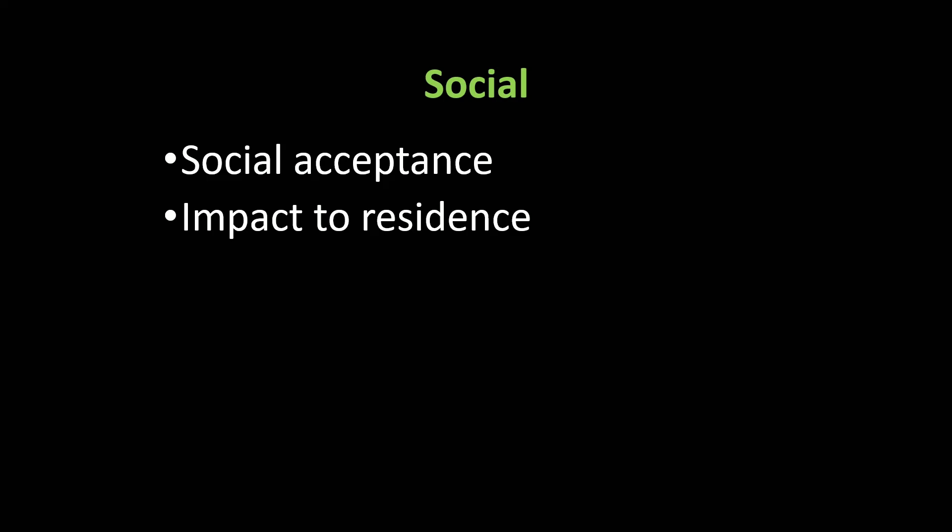Our social environment is all about people in society and how they may feel about our project. Will they accept this project or the products resulting from it? If you are constructing a new coal-based power station, you can expect criticism in today's world. What about the local residents? How will they feel about any disruptions and disturbances to their everyday life while the project is being undertaken? Consider the not-in-my-backyard attitude that locals often have. Our planet is made up of a huge range of cultures and beliefs which should be respected, though that may also provide us with some challenges.